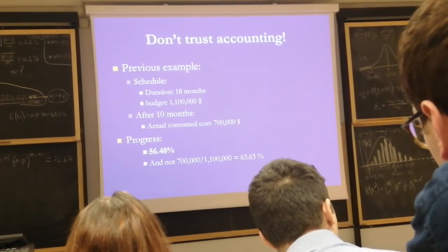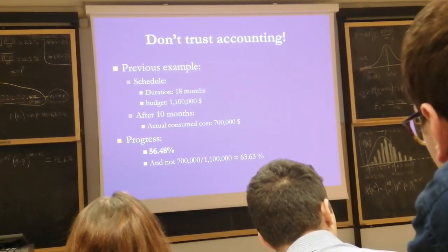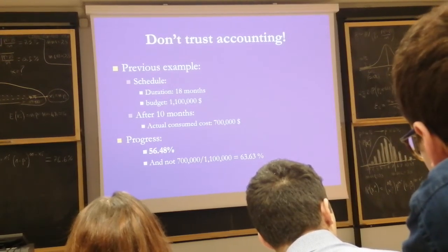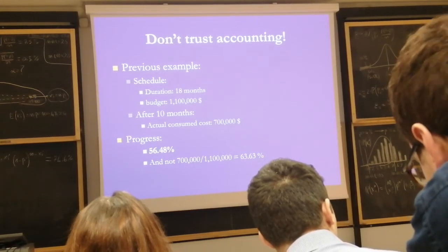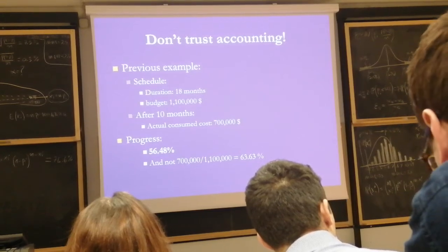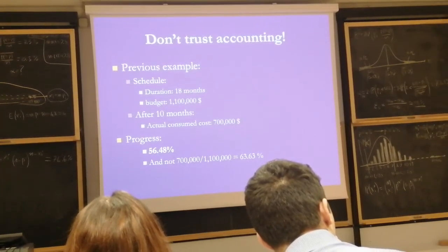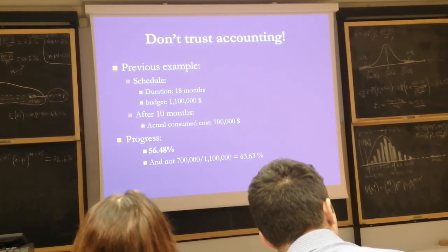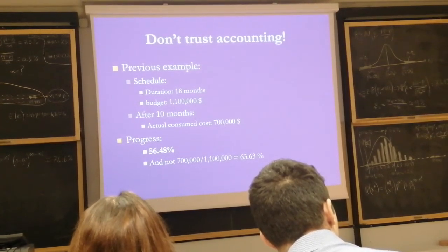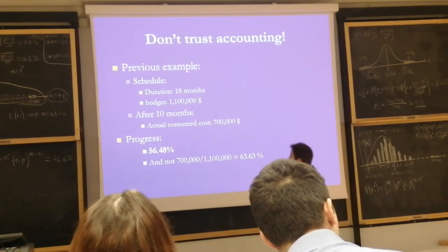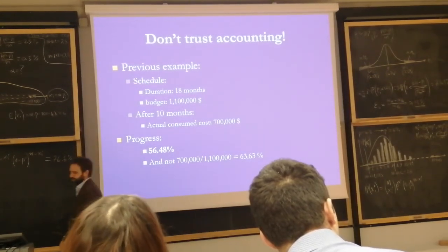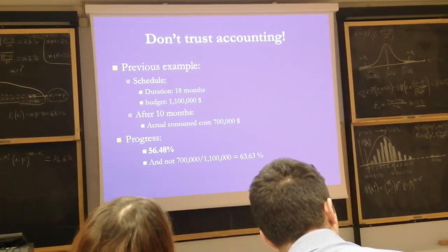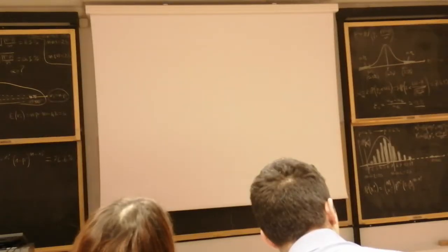So just to let you know, the original schedule was to finish 60% now, after 10 months. With this extra information now, you can understand performance. So let me add that after 10 months, WS is 60%.